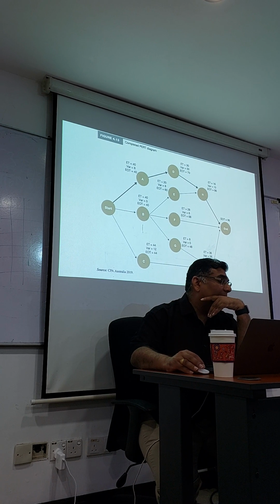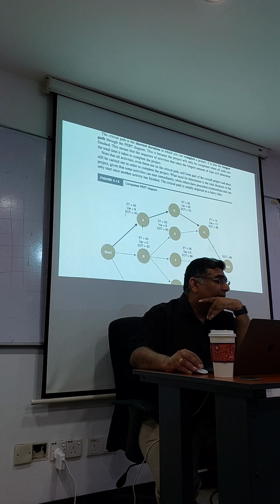So this is the estimated time here, ET, alright? Let's look at this part. This one is 40 days, are you clear? Yes. Okay, ET is 4, variance is 8, alright? Then you go from here to here, 30 days, are you clear now? So 40 plus 30 is going to be 70 days, all right? Okay, and from here to here is 16 days. So you get 86. Down here is 86 already. Okay, at the end is 86.